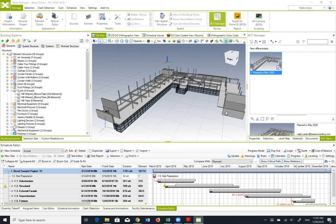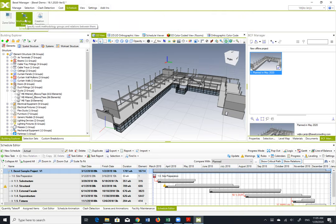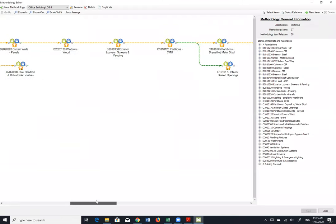So you have defined the smart selection sets, and whenever you do those selection sets, you have the entire schedule automatically updated. So the workflow will be that whenever you update to a new version of, let's say, IFC, you can update those new elements within Bexel Manager. Then if you have defined smart selection sets, you can immediately create a new cost assignment to those elements. And when you have this cost information, by knowing within the methodology when those activities have to be done, the system will automatically create a lot of additional tasks, even between already existing tasks. So this is the huge benefit, and this